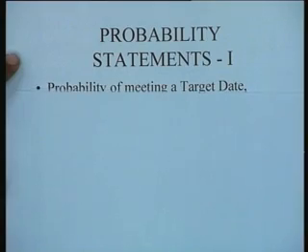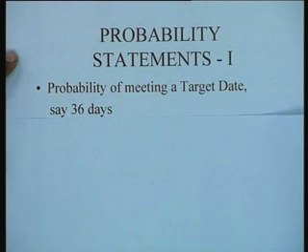Say one kind of statement could be: what is the probability of meeting a target date? This is the kind of information that a project manager would be very interested, very much keen to find out. Now let us say that the target date for our example is 36 days, right? So it's like trying to say if you're working 6 days a week, after 6 working weeks. So what is the probability that the project will be completed after 36 days? This is the point that I want to find out.